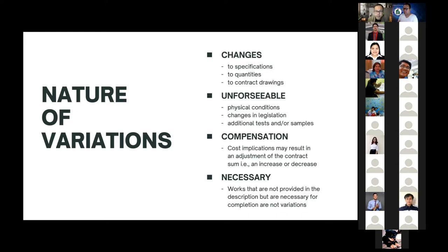In other words, if a specific work that is not included in the description in the bills of quantities or in the specification in the contract documents, but indispensably necessary, meaning the contractor cannot bring that specific work to completion without carrying out that work, then that is not a variation order.